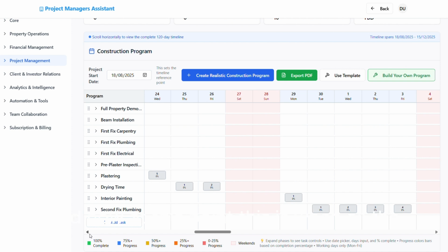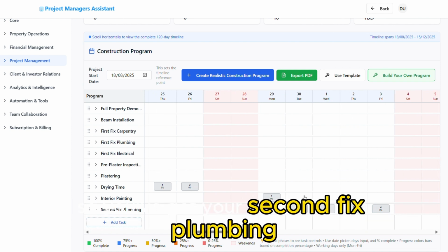Now at this point, all the carcasses get connected back up again, so you can fit the pipework for the kitchen sink and everything that goes in there: your washing machine, any built-in dishwashers, any fridges, anything that needs water. This is when you get your carcasses on top of the plasterwork, all going behind your units. So you've got your second fix plumbing.